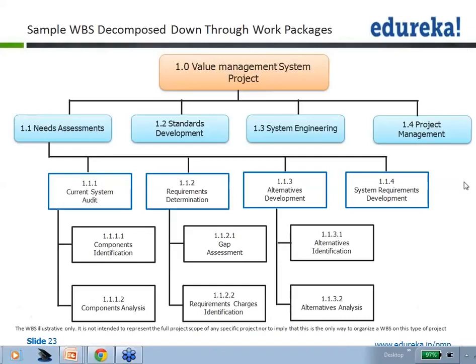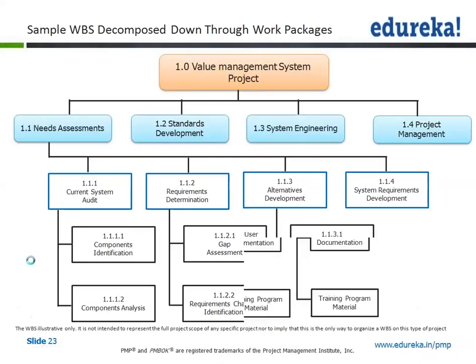That means there is a structure in which we have broken down the work to be performed into smaller activities, and this is what is called a WBS. And the smaller items here are called work packages. So from the perspective of this sheet, if I look at the components analysis, which is 1.1.1.2, this becomes my work package. So now you know what I meant by the work package.